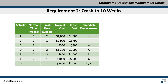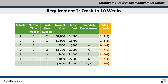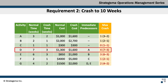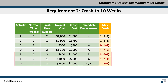Now let's proceed to requirement 2 to crash this project to 10 weeks. First, we calculate the maximum crash time for each activity, which is simply the normal time minus the crash time. For activity A, the maximum crash time is 1 week (3 weeks normal minus 2 weeks crash). Activity B can also be crashed by only 1 week (2 normal minus 1 crash). Activity C cannot be crashed at all since normal and crash times are both 1 week. Activity D can be crashed by a maximum of 4 weeks (7 minus 3). The same methodology gives maximum crash times of 3 weeks for E, 1 week for F, and 2 weeks for G.